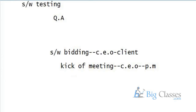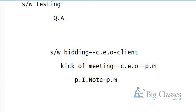Once the kickoff meeting is completed and the project manager is selected, the next stage is the Project Initiation Note. The Project Initiation Note is prepared by the project manager and consists of the details of the project — not requirements. Details and requirements are different. This document includes client information, project duration, domain, and all relevant information.